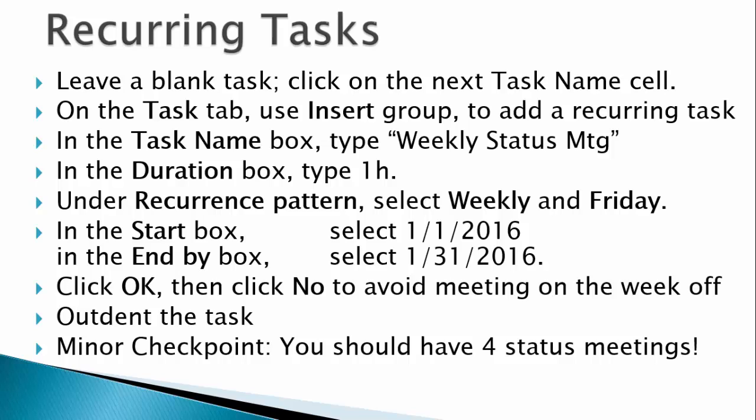One other way of handling this, which I mentioned at the beginning of this course, is to define team members with 80% capacity to allow for some time off and meetings.